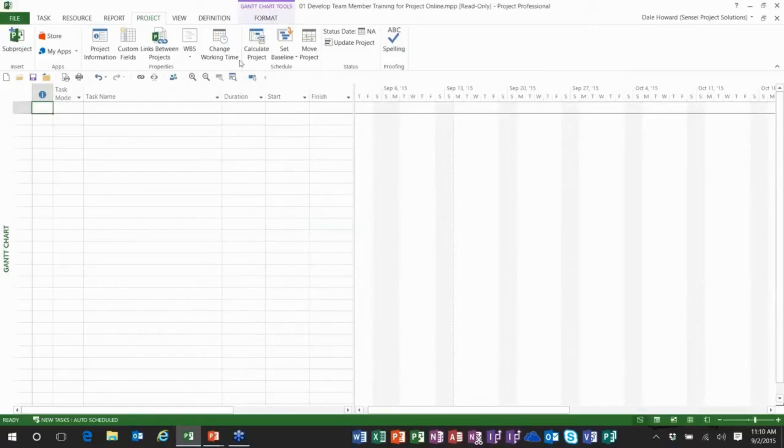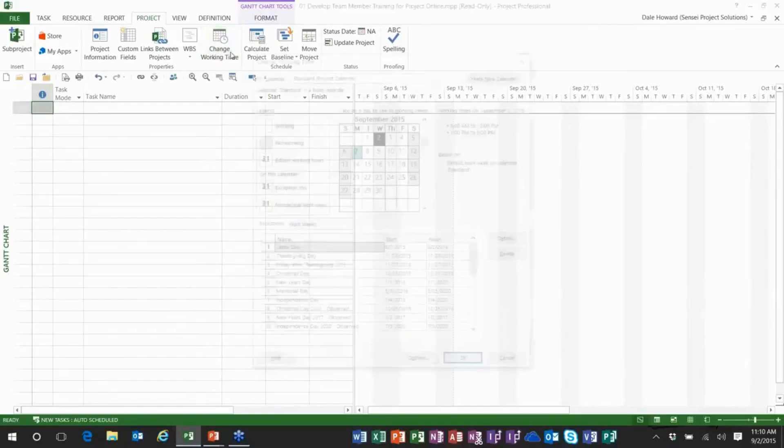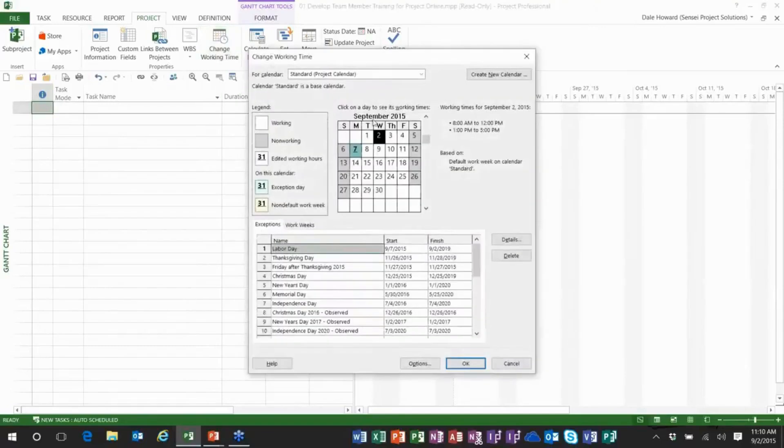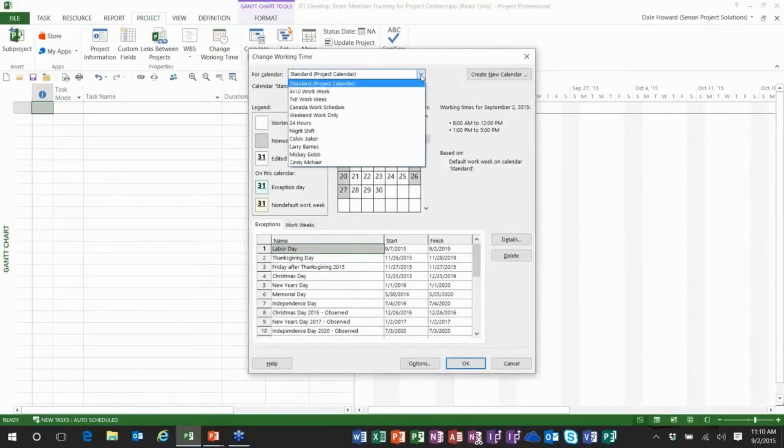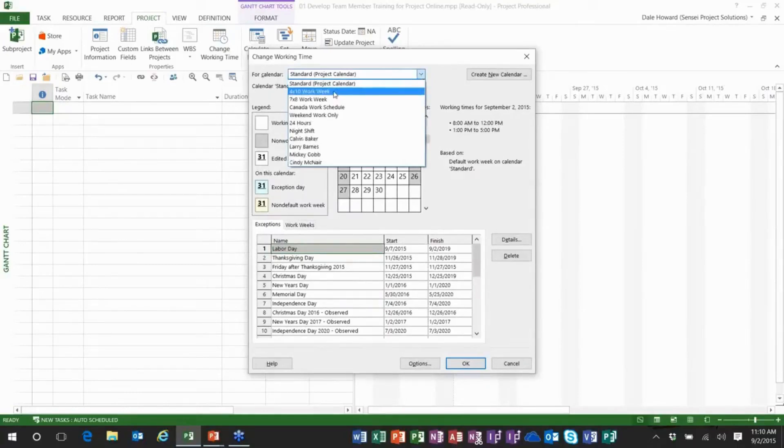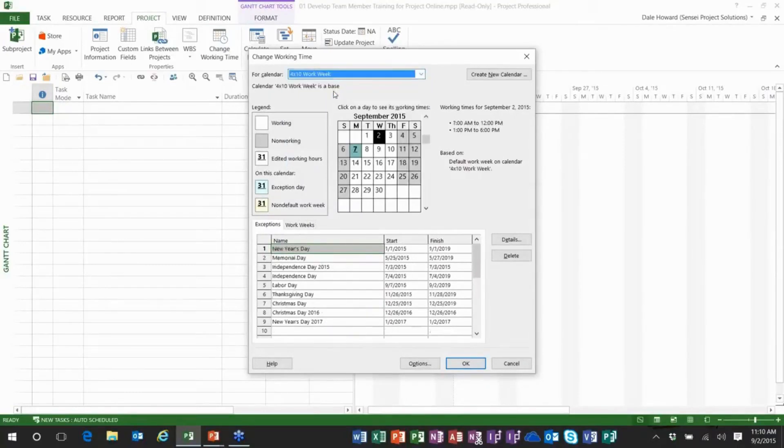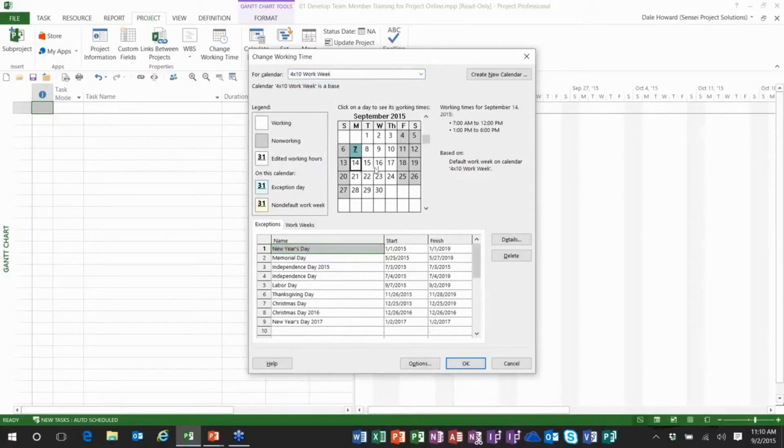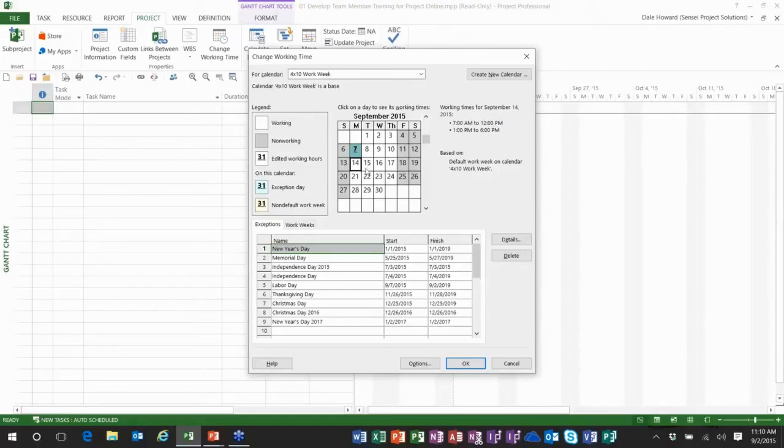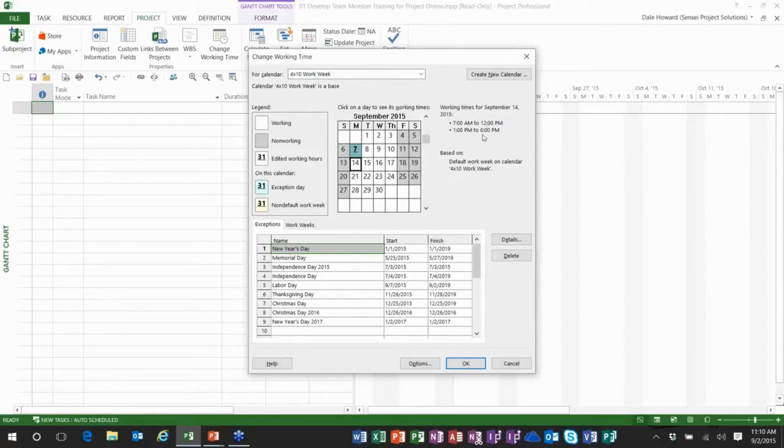Next thing I wanted to show you is a few of the other calendars that I've actually created in my project just to show you how they can address unique scheduling needs. I created a four by ten work week calendar specifically for the resources in our organization that work a four day work week. They work ten hours a day, Monday through Thursday, and they get every Friday off. So you can see the working hours up here,